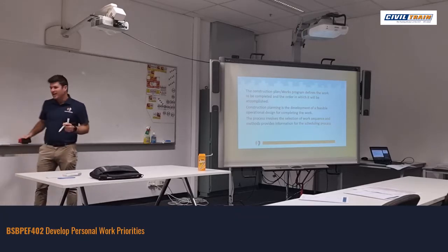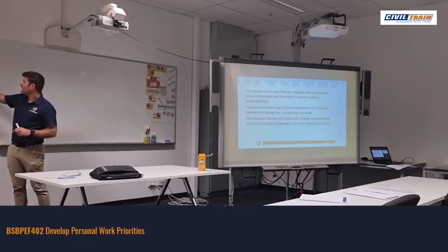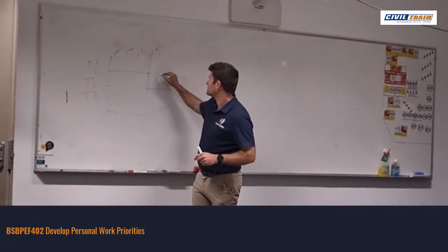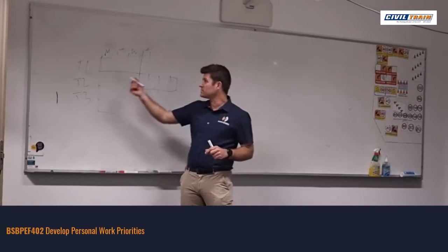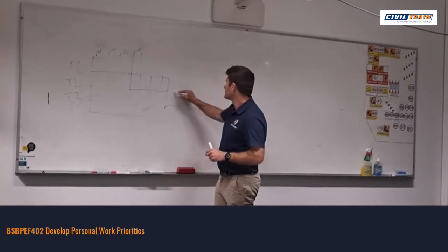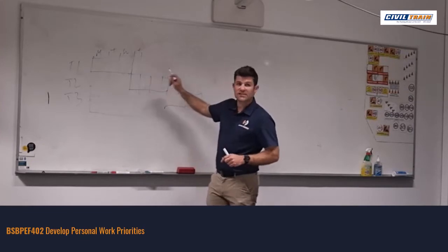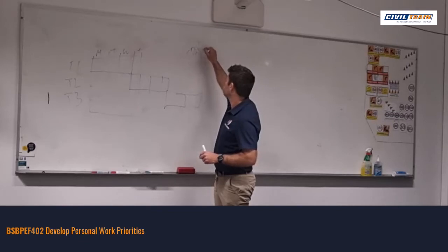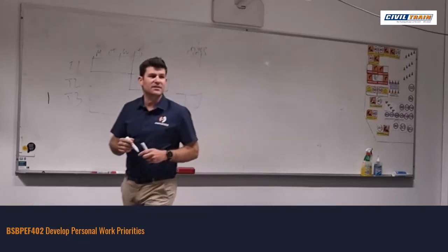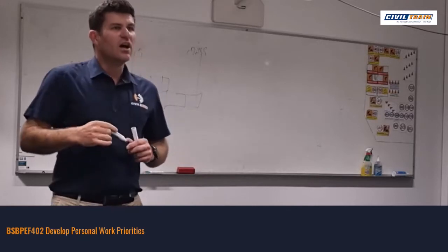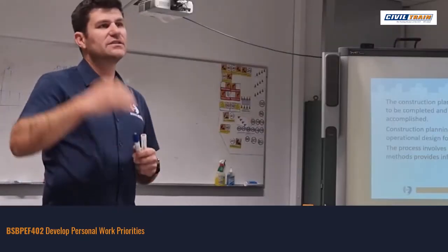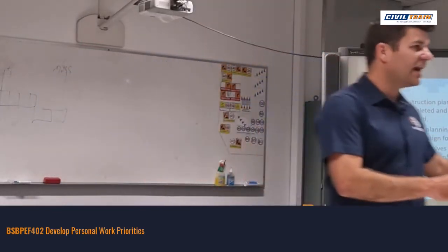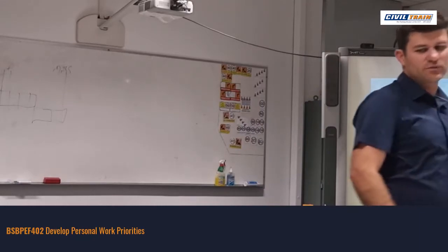where the cascading bar chart comes into play is that when task 2 is dependent on task 1 being completed, that's when we would start task 2. Task 3 is dependent on task 2 being completed, and then we would complete that. And obviously then we can start seeing progression on days, in regards to the completion of that task. Obviously it's going to list the tasks in sequence, and that's something I'm going to get you guys to do in the team: look at that and work out what the potential tasks involved in doing that project are.